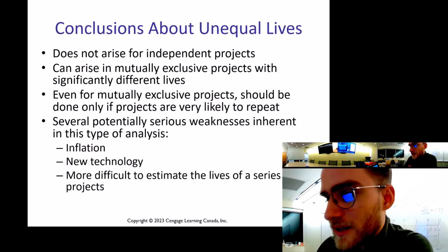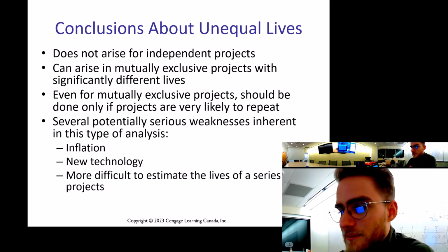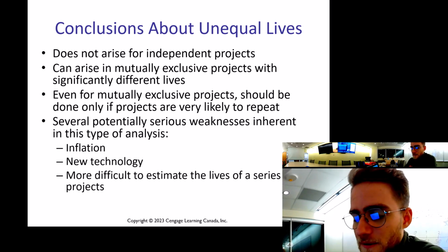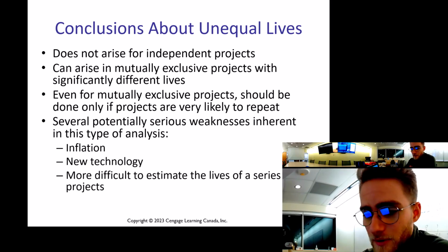So conclusions about unequal lives do not arise from independent projects. They can arise in mutually exclusive projects with significantly different lives. Even for mutually exclusive projects, this should be done only if the projects are very likely to repeat.